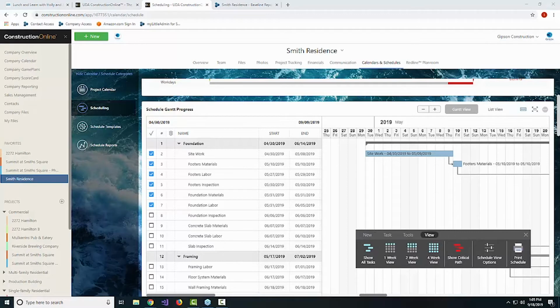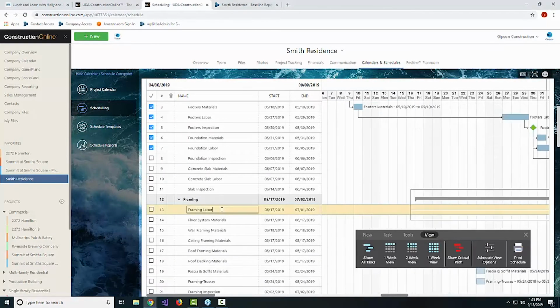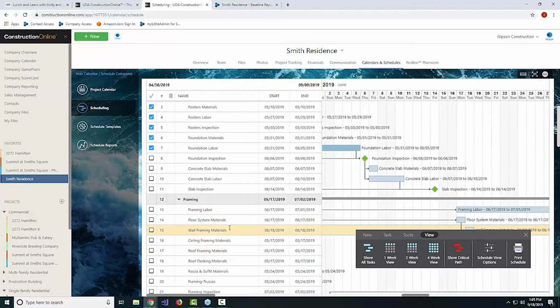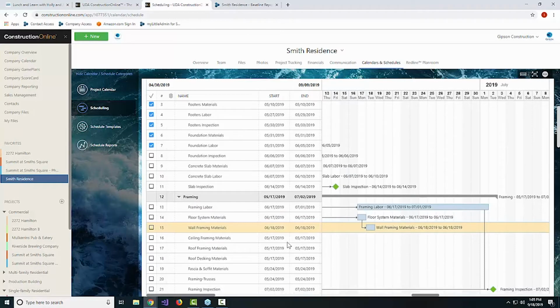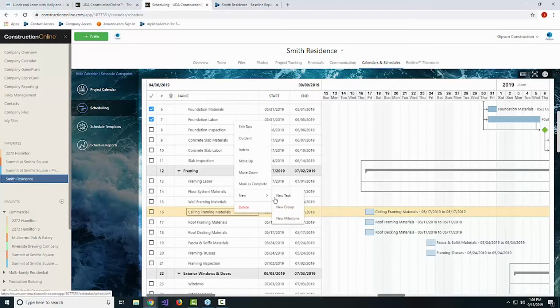well, there wasn't this task before, and now a task is here that was for 6 days. Let's say, knock on wood, because we're in hurricane season, a hurricane comes through and potentially delays your project by up to a week because of the preparation beforehand and the time afterwards. I'm not saying, and really hoping we're not speaking this into happening, but having a hurricane come through and delay the work on site, hopefully not causing any damage. You could track that and show in this report, well, this really was outside of our control, versus, well, we were 2 days behind on our framing work.